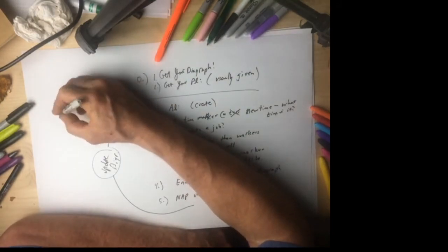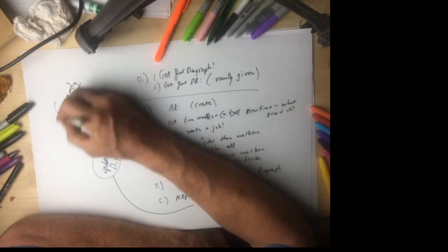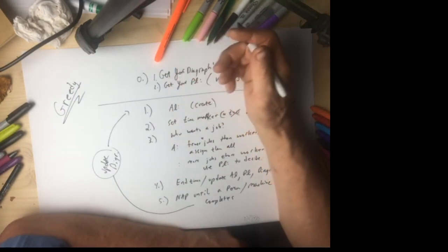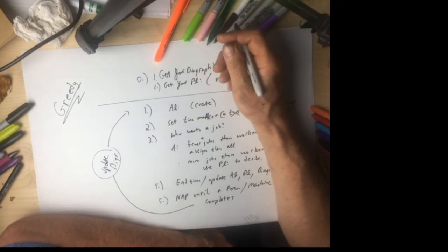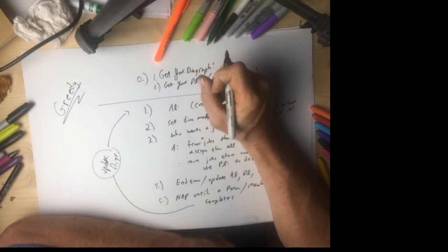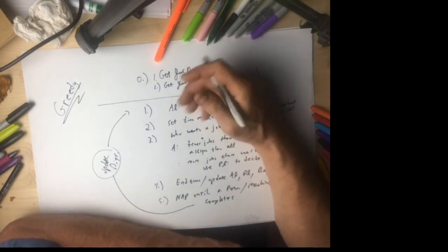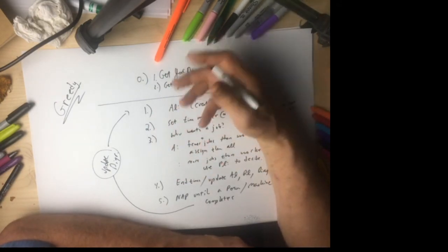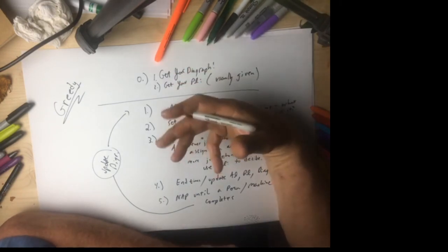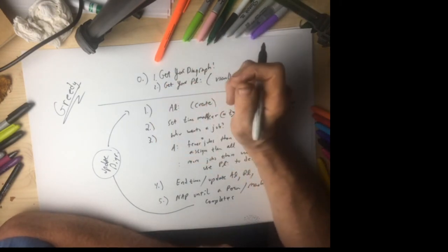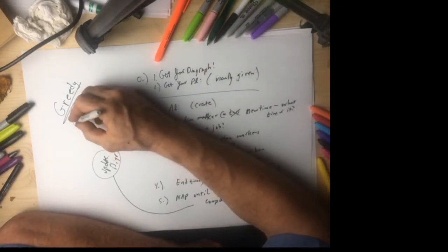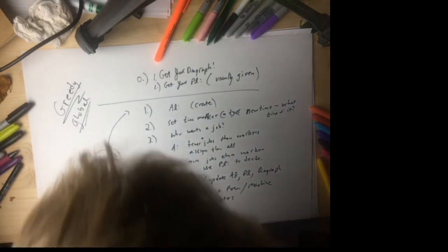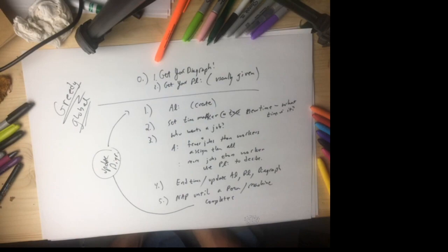Now, I want to point out that this algorithm is greedy. A couple reasons. The boss gets to take naps. Second, never wants the people to be idle. Third, as soon as a job is available, it's put on an available list and tried to be dispensed by the priority. The algorithm itself is trying to achieve something, usually shortest time. Hence, it's a greedy algorithm. It also appears to be global because it's trying to use all of the information. Did it use it well? Well, we're going to actually discover that, or if not.